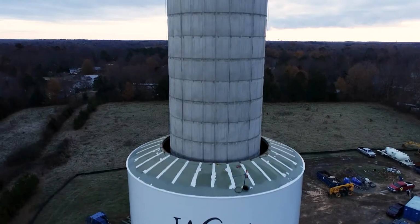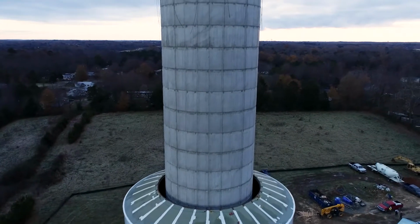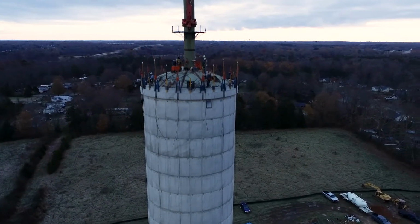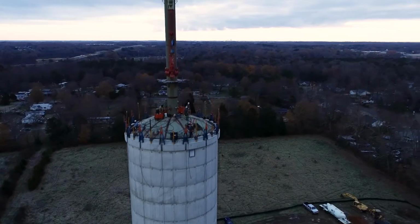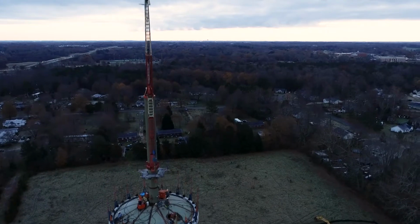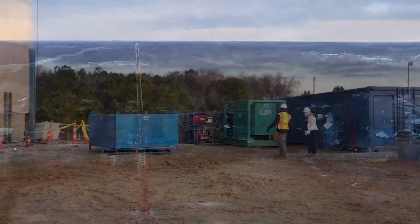And now today is probably one of the most important milestones on the project, which is the hoisting operation. So it takes a couple of weeks, maybe a week or so, to assemble all the rigging to make the hoist, and then the hoist operation itself occurs over again 1 day.